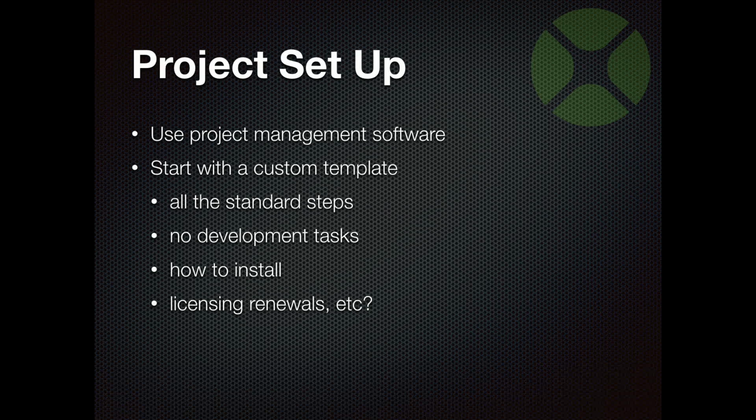When do you have kickoff meetings? And how often do you have status meetings? And all of the things you do to set up a project. It might even be things like reminding yourself to invite the client into your project management tool. So the template is all those things that you don't want to have to remember, that you just do every single time. And then when you open your project, you can actually pull in the development process and steps from your proposal.